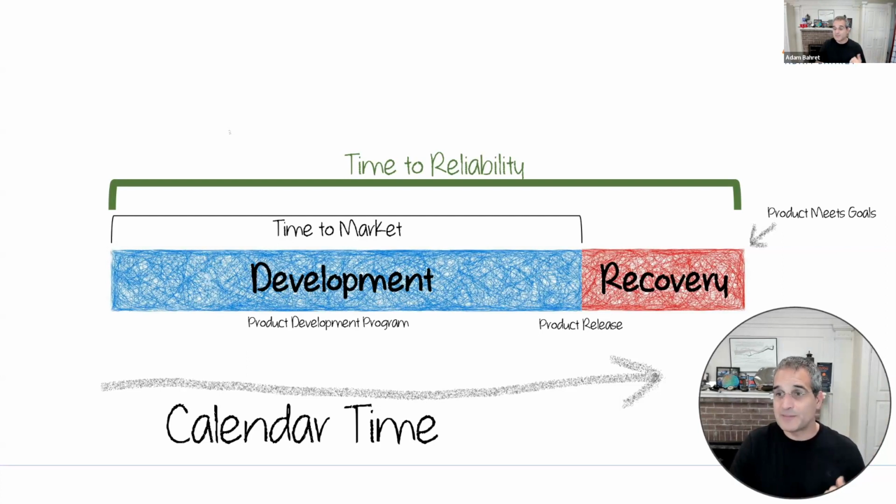Time to reliability, you should set up some kind of metric in-house that defines it. It might be that our investment budget drops down to 10% of what it was when the program was running, whatever its regular burn rate was. When it gets down to 10%, that clearly means we've moved on, right? We're just doing expected continuous improvement. Or it could be headcount, or it could be all kinds of things, whatever you believe is an honest reflection of the program concluding to where you are moving on to another program. I think it's critical. But here's the most important part.